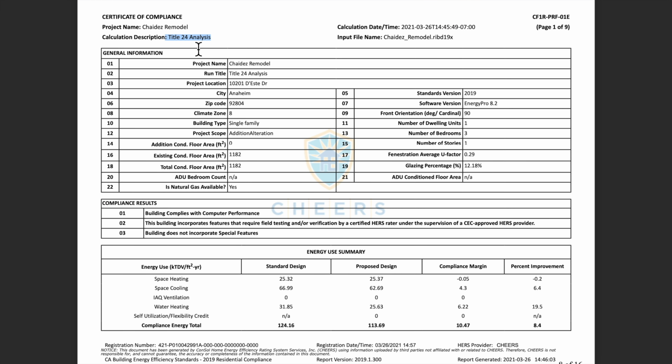If you have unpermitted work being done, you will get a stop work notice and you will no longer be issued permits. And you may ask, why do I need permits? Well, if you're fixing and flipping, you might come across a buyer whose lender is requesting permits for the new roof that you have issued. And if you don't have them, well, there goes your buyer.